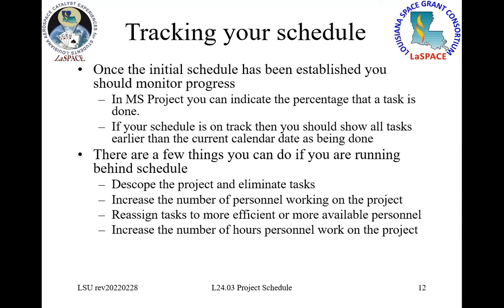Different people working on a project may have different time availability. Some people may have a really hefty course load, and so they're only available 5 to 10 hours a week. Other people may be working up to 20 hours, so you might be able to reassign some tasks to people who are able to work more, or somehow increase the number of hours that people work on the project.